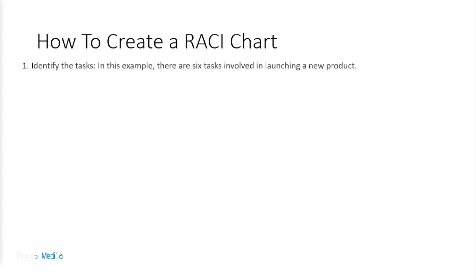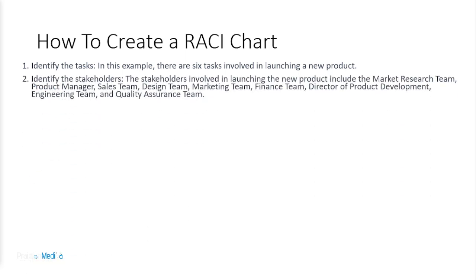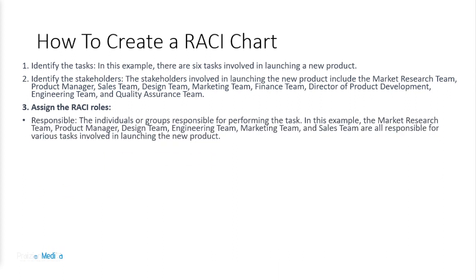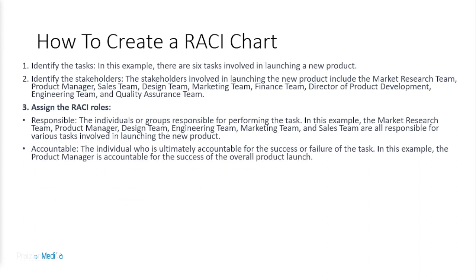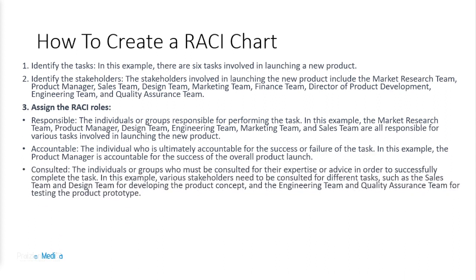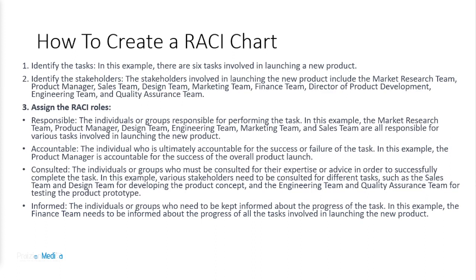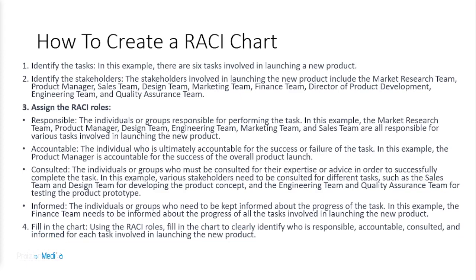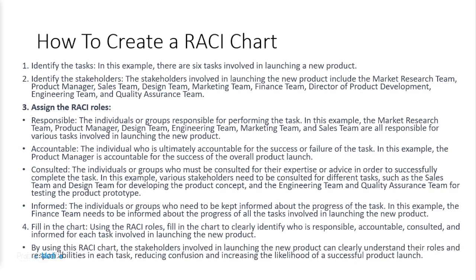So how do you create a RACI chart? You identify the tasks — in the example I'll show you, there are six tasks involved in launching a new product. We identify the stakeholders — people who could be involved. Then we assign the RACI roles: responsible — the individuals performing the task; accountable — ultimately answerable; consulted — the individuals or groups who must be consulted; and informed — the individuals or groups who need to be kept informed about the progress of the task. Then we fill in the chart to clearly identify who is responsible, accountable, consulted, and informed. Beware: you don't want two A's in any one task. By using this, the stakeholders involved in launching the product would clearly understand their roles and responsibilities.